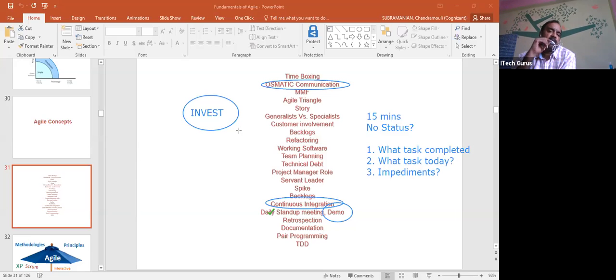Whereas in the traditional project, we give the entire product for a demo. The customer will accept the whole deliverable, or reject the whole deliverable. But here, the deliverable itself is a product, correct? The product consists of multiple stories, right? So the customer will not say, I reject product one. Rather, he says that in product one, I accept story one, I reject story two, accept story three. You will test it and do it. Any questions on this, team? Demo? All of you? Is that clear?